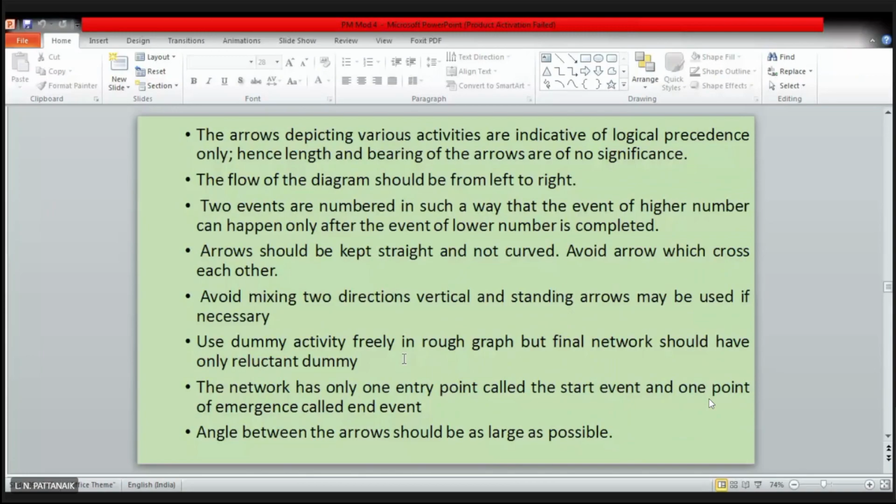It should not look like that. It should look like a closed graph, right? Closed graph means there should not be any event or node which is dangling without a complete loop. Right? So your starting point and your end point, which are nodes or circles or squares, have to be single nodes, right? You cannot have 2 or 3 starting points. Neither can you have more than one end point, right? Is it clear? Okay, you will not respond. No, it's clear.